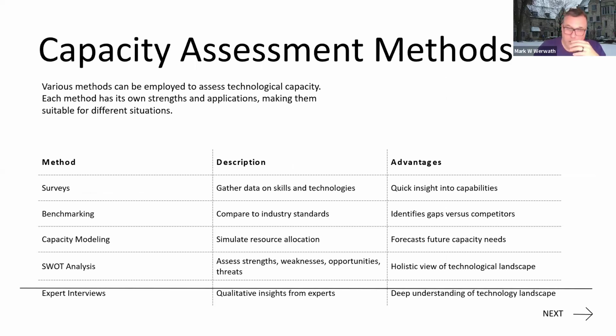I've used all of them, but I've also done one more, which is really more of a database approach, where I have people filling out various aspects of a relational complex database. So understanding where everybody is assigned for the next, say, 12, 18, 24 months, always looking into the future, name by name, resource by resource, skill by skill, task by task, project by project. Mapping all of those things together in a single unified database is what has been most successful for me.